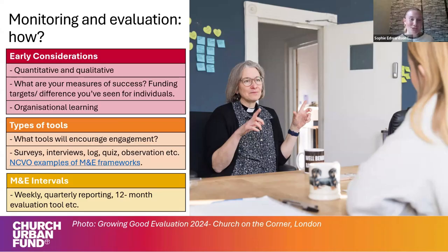With quantitative measures, you could look at the number of attendees, potentially noting through observational method the number of young people, potentially the number of meals, baby bank parcels, whatever it is that can be some quant measures that you can draw out of your project work. And then looking at qualitative measures as well. These are descriptive, non-numerical. They can be more geared towards the experience of your participants, the motivations for why they are engaging with your project continually, and the perceptions they have about your project or the experience that they've had, the journey that they've personally been on.